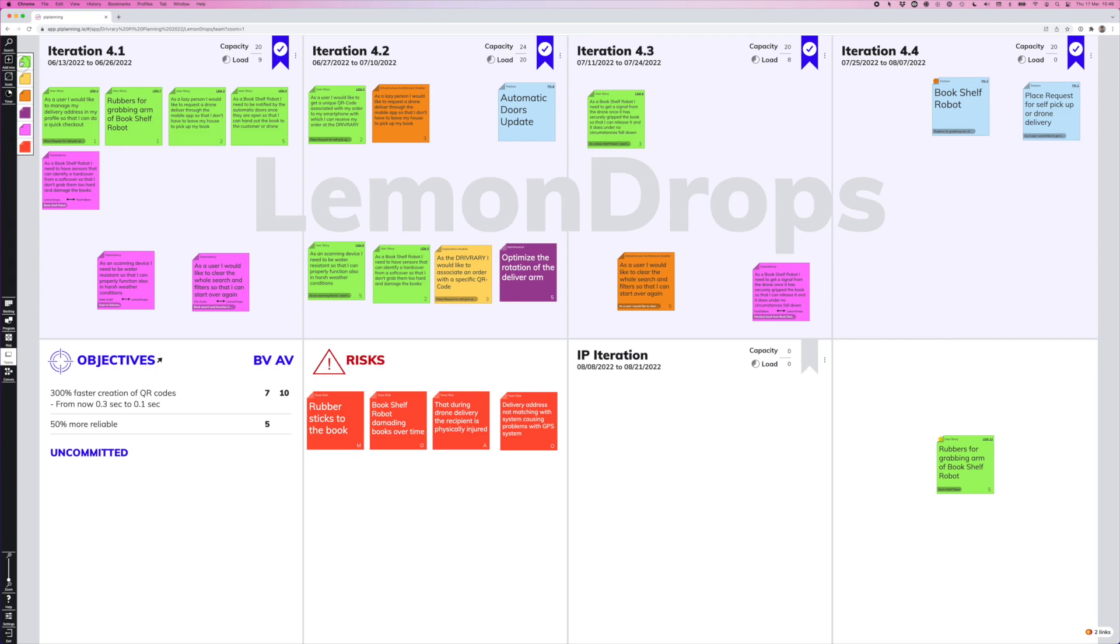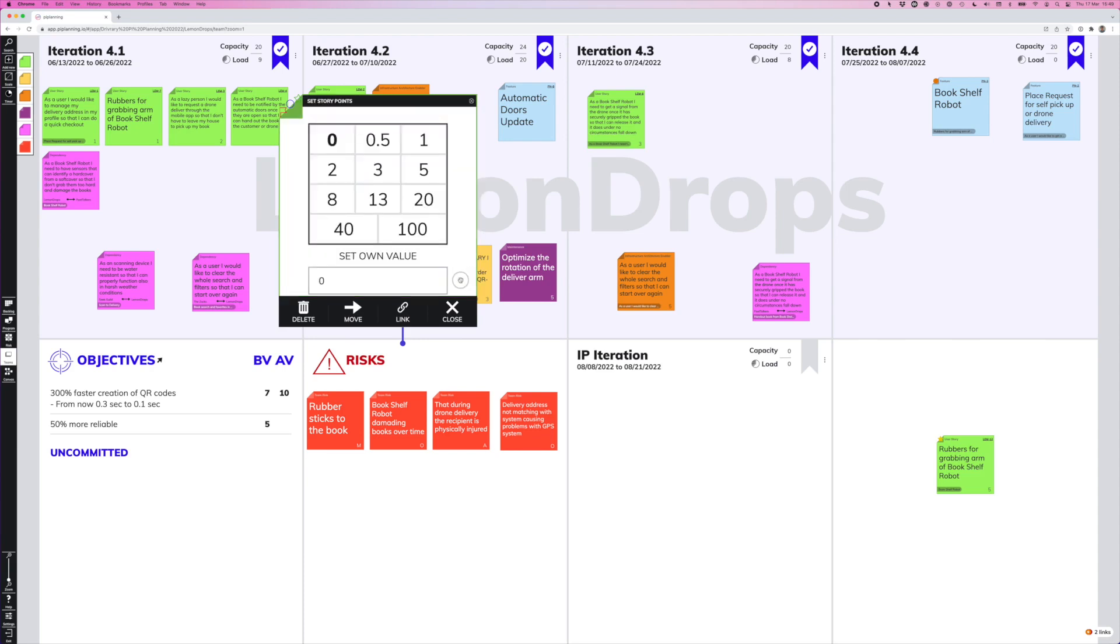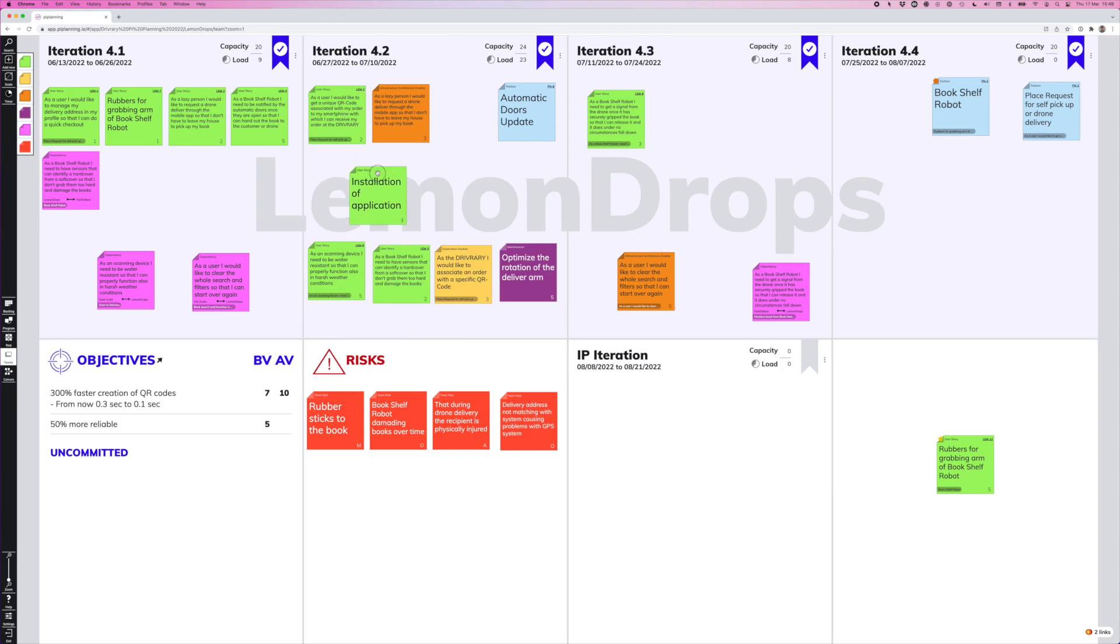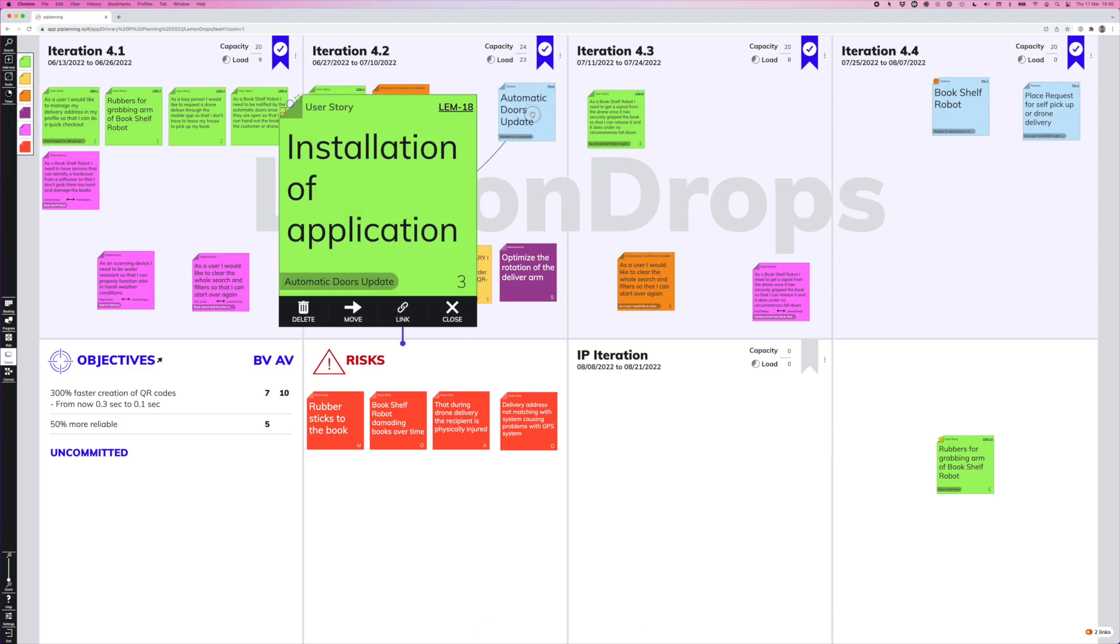And we can write down a quick summary of this user story. We can also apply a story point value from the Fibonacci selector, or if we use our own values, we can simply type in any value down here. And since we are breaking down the feature into user stories, we also want to link this user story directly to the feature. So we can just grab this string hanging out at the bottom of our user story and drag it over the feature and release. And that's how simple it is to link a user story to a feature.